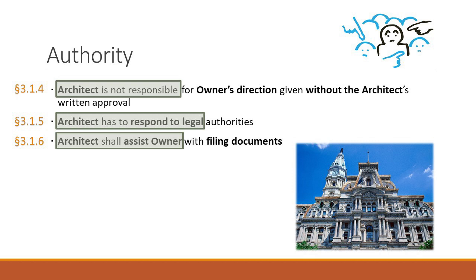You have to, because we've got to keep the project moving, and you have to do it on a timely basis. Now, the architect was paid for those because the architect didn't make a mistake. It's just the village was doing what the village does. But this is an obligation. It says if we do get something back from the governmental authorities, we've got to look to the architect to fix it, or fix the drawings to conform to that.